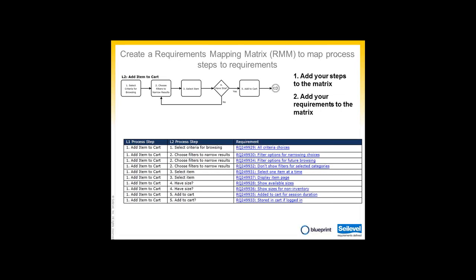The third thing, I think, is a huge value out of this: you can find requirements that you don't need, that scope creep. So if somebody's told you requirements, you go back and you try and map them back to a process step, and there isn't one that they map to, then that's a good indication that you probably actually don't need the requirements. It also might be an indication you're missing a process step, so be open to that. But again, it's that two-way. I'm looking both directions to see where do I have extra stuff, or where do I think that maybe I'm missing them.